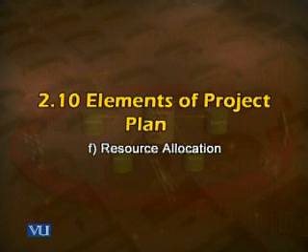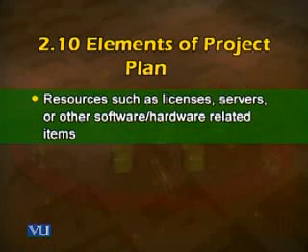Next important element is resource allocation. As a project manager, in order to implement or execute the project activity, you have already defined what resources you need. But when you are working out the software development plan, here you now have to define all these resources, including hardware, software, and wherever needed their licensing, because piracy is not allowed, you will work out the licensing requirements. The versions of different software, or some intermediate inputs or products, are all the things you need to complete this project. First you access them, then you make a distribution plan: when, to whom these resources are going to be made available.